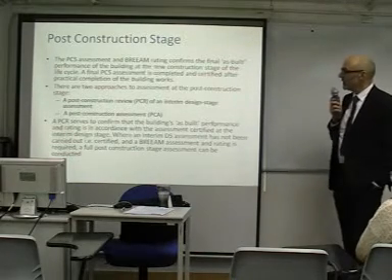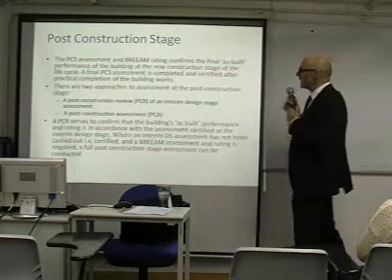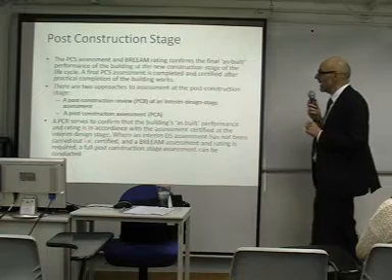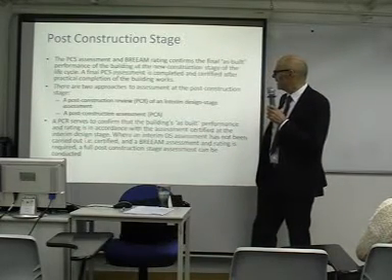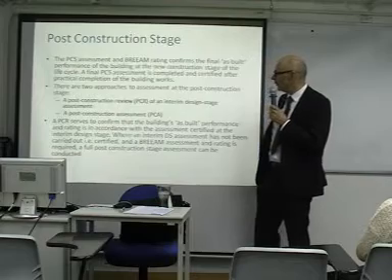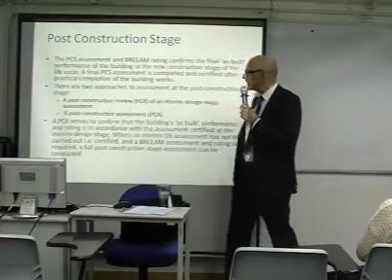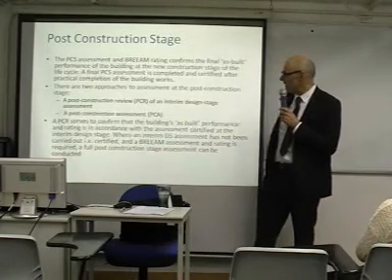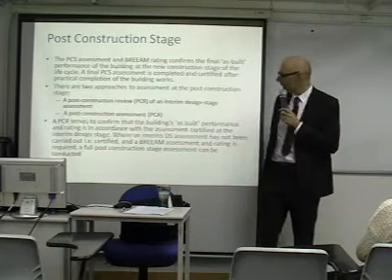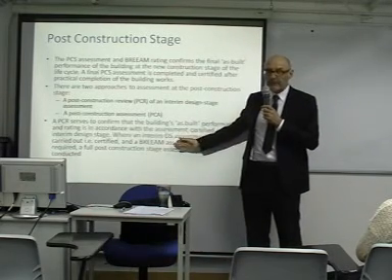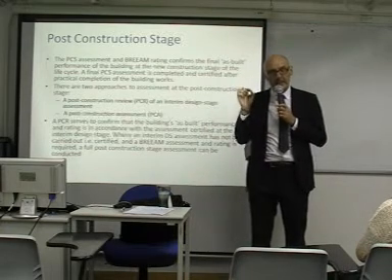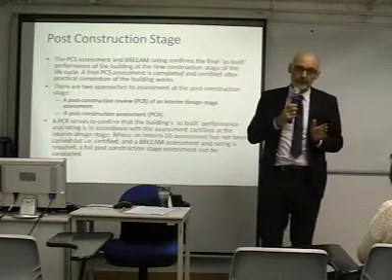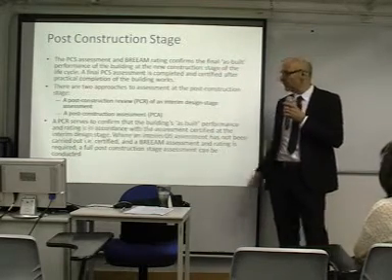To finish off certification, we go into post-construction. And basically, post-construction assessment and the BREEAM rating confirms the as-built performance of the building. That final assessment is completed and certified after partial completion of the building works. There are two stages in that: a post-construction review, or PCR, of the interim design phase, and then a post-construction assessment. So this allows confirmation to be done, obviously. We should not underestimate just going through those processes and assessing that things are actually put in place. Again, there's a really good number of good case studies around which have shown how this is actually put through and can be achieved.